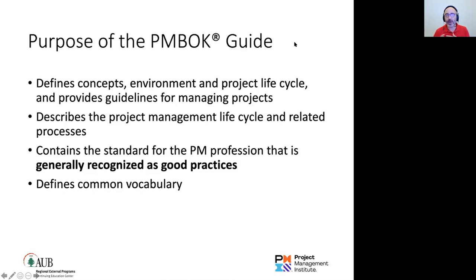Just like engineers, architects and lawyers have books of standards that they follow, accountants have IFRS or International Accounting Standards that they follow. The PMBoK is this book of standards that you follow, but can you follow 100%? No chance. Should you do the 49 processes across all projects? No. You decide which processes of these 49 apply to your project.